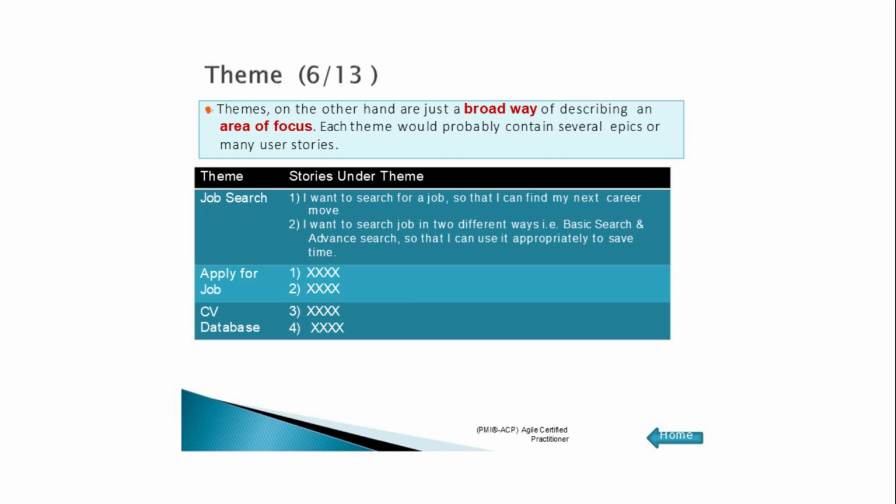When writing user stories, it's important to focus on customer needs, use simple language, include unique story numbers, prioritize, estimate size, and ensure stories are testable, independent, and achievable. These considerations help create clear and actionable user stories.